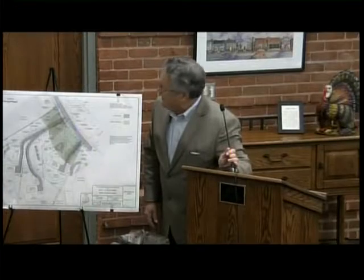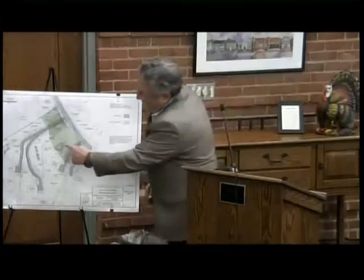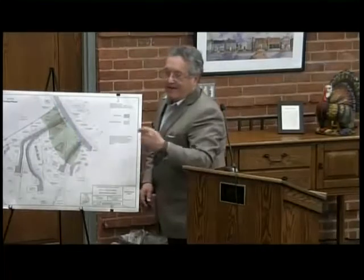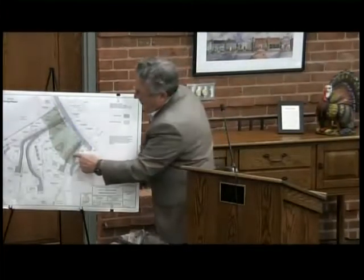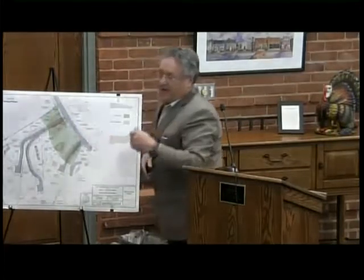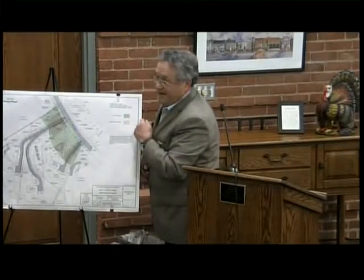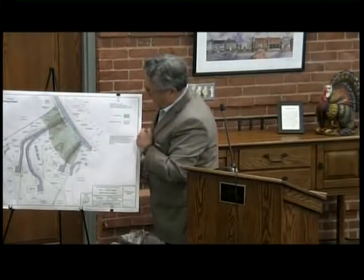However, part of that is stormwater management areas. So there's an infiltration pond here within the riverfront, and that's a stormwater management area, and that's allowed within the riverfront area by regulation. And also infiltration systems here and here are allowed within the riverfront area. So that reduces by 3,600 square feet. So the amount of disturbance then is 15,300 square feet.